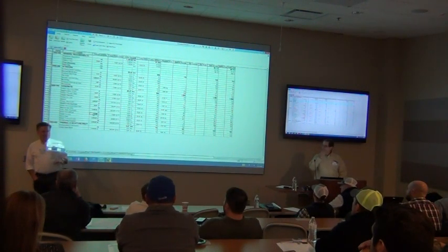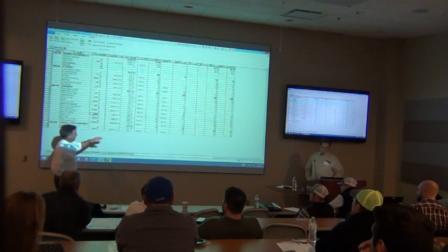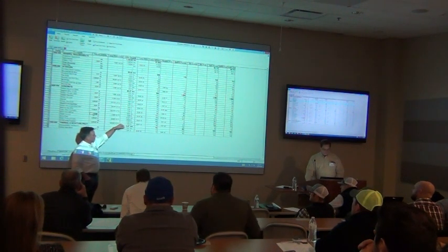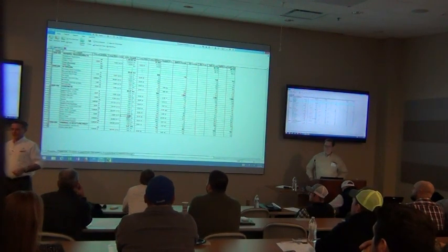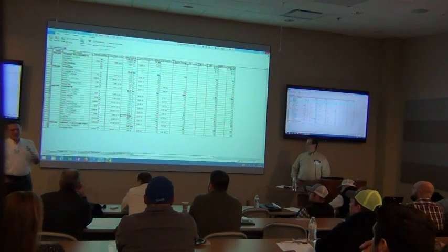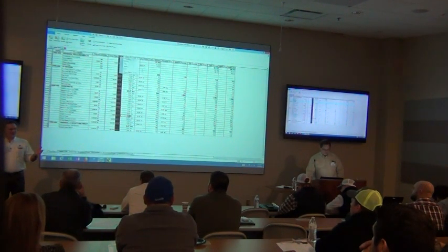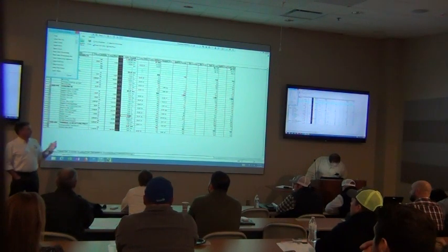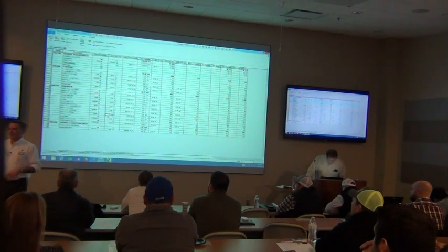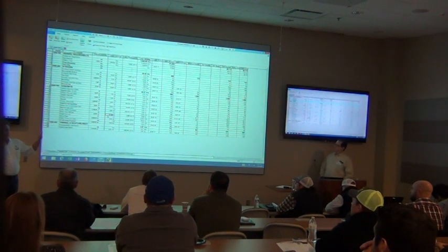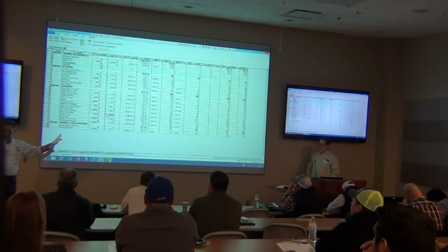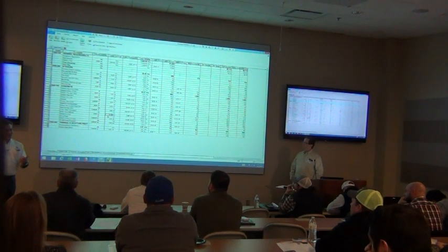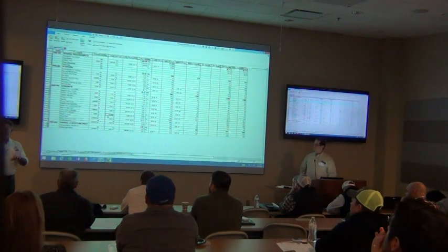Everybody tends to look at things a little differently. You try to open up enough columns to give information. For example, you can see a dollar per cubic yard, a number of cubic yards per hour, a dollar amount per yard, or a dollar amount per square foot. If you look at the columns differently, it helps you look at it and say, 'It's $10 a square foot — that doesn't feel right.' Or 'I can't take 70 man-hours.' If you present your information in a way where you can see different calculations on the pricing or production, you get that gut-check feel. If something doesn't seem right in one of the columns, go back and look at the whole thing.